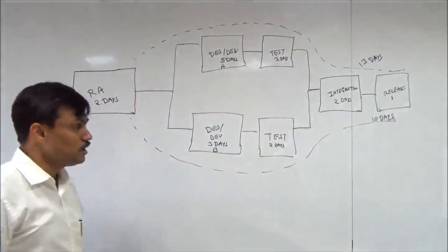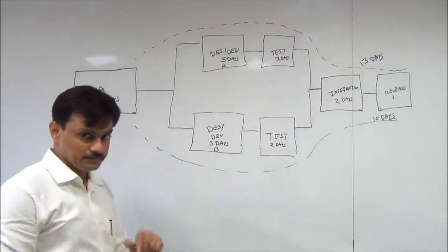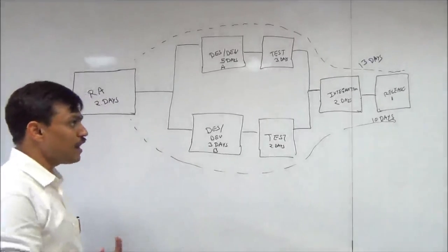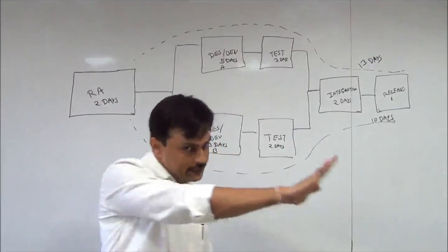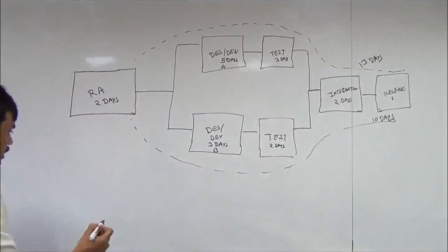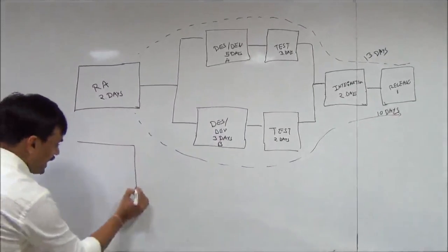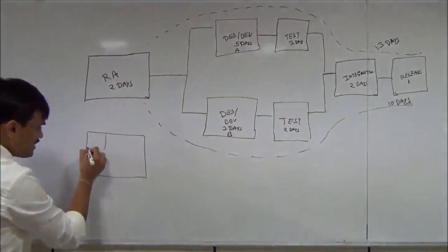But in general, network diagrams are not that simple. So in order to identify slack, we need to do a forward pass and a backward pass. What is the forward pass? We can visualize one activity box, and we plot it for every activity.